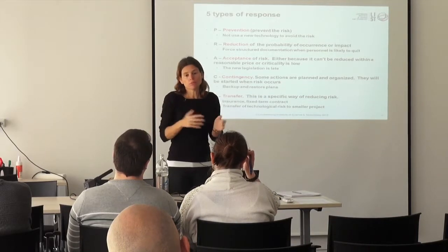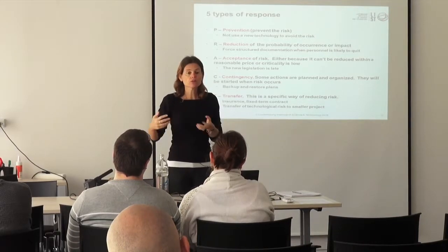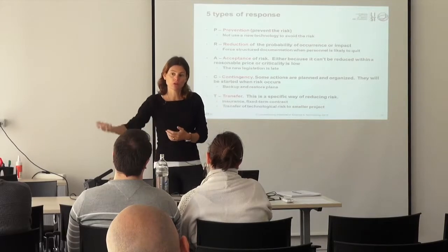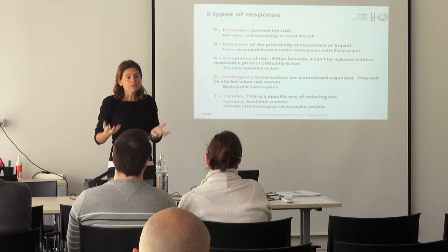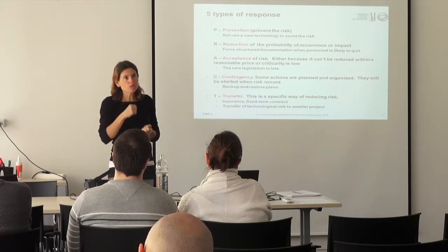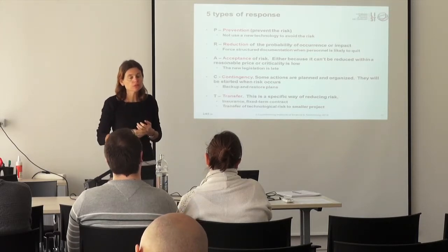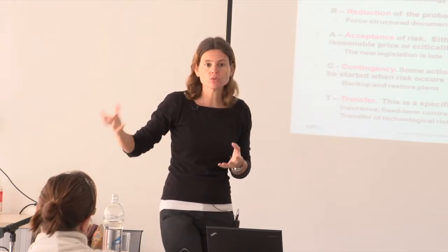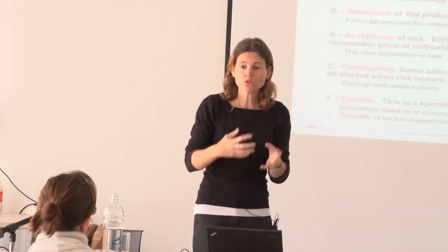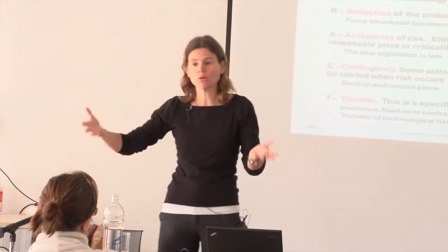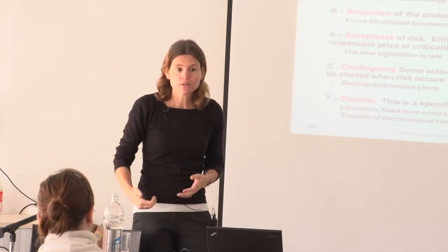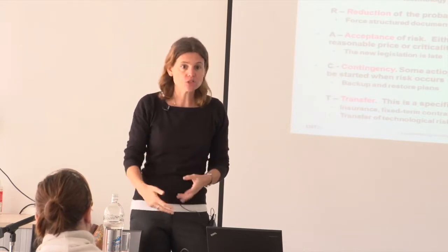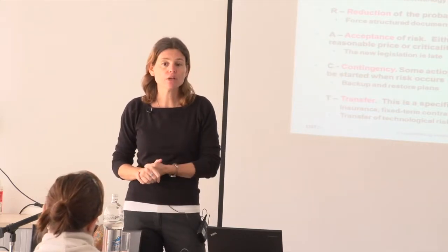Then your project is not supporting the entire problem that is coming with that risk. At the end, it will not solve all your problems. It's not because your supplier was supposed to deliver one part that you had to integrate to build your final solution. If they are late, you're late and your project is late and your final solution will be delivered late.